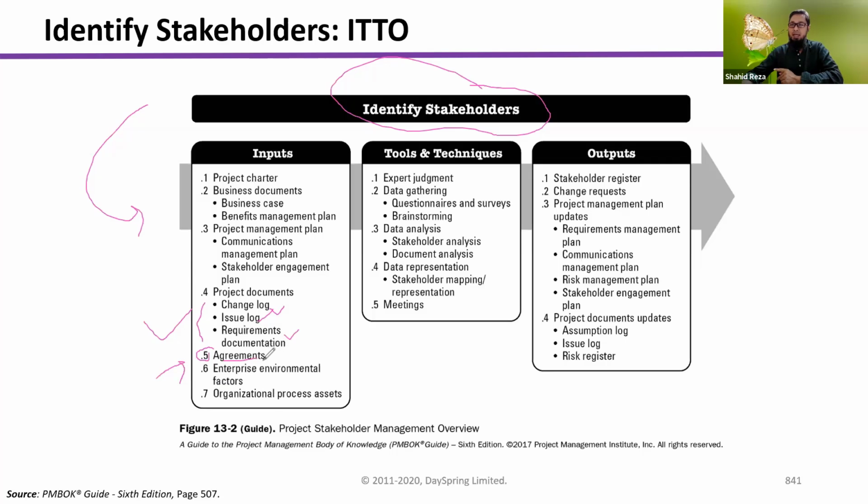And sometimes, you see, this is plural: agreements. That means one project may have a couple of agreements with different companies and different suppliers. So for every contract you have to gather the stakeholder names to write in the stakeholder register. That's why it is agreements, plural.